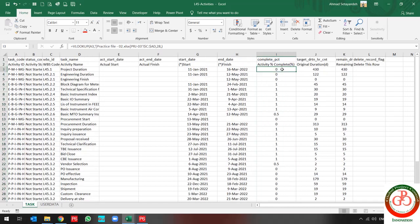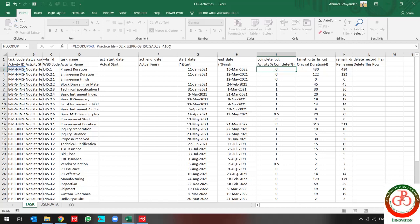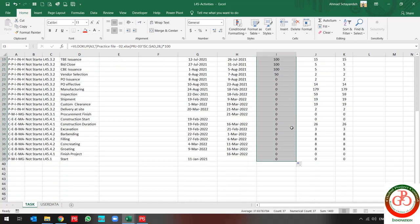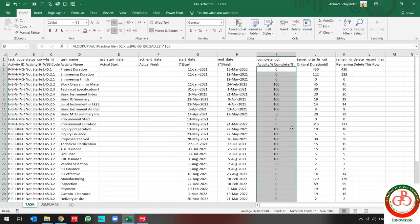Because that data is in percentage, I should multiply it by 100 because Primavera P6 does not accept percentage values in activity percentage complete.